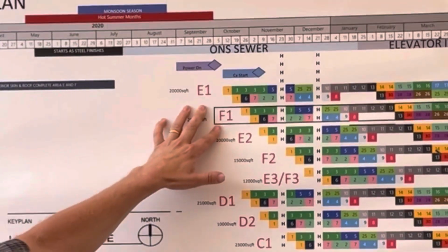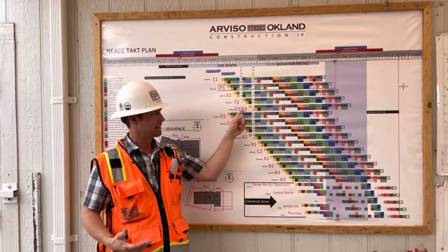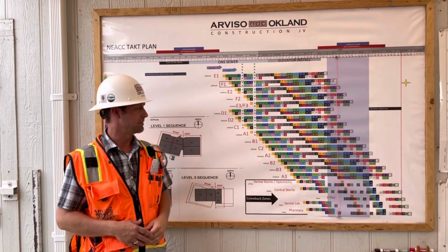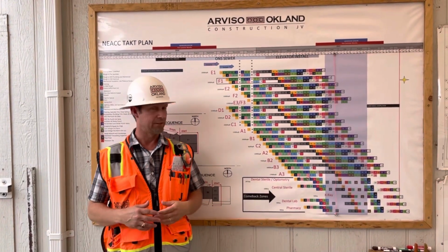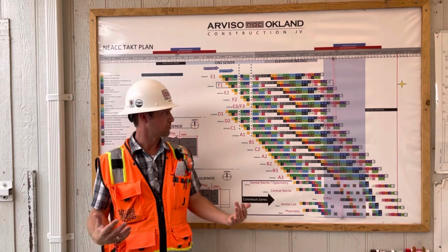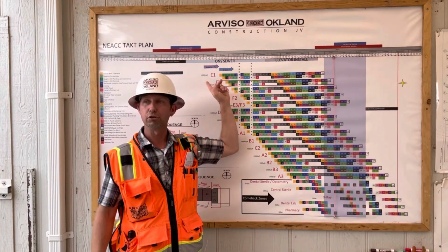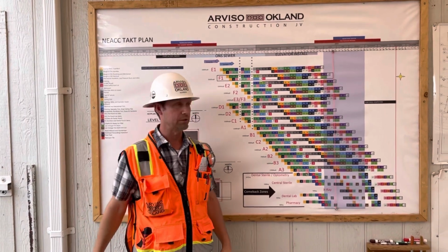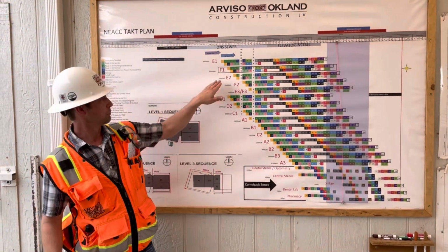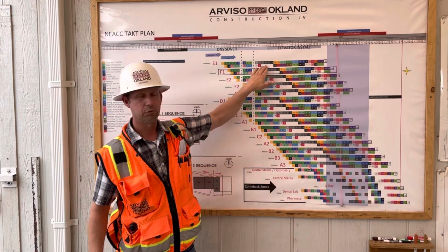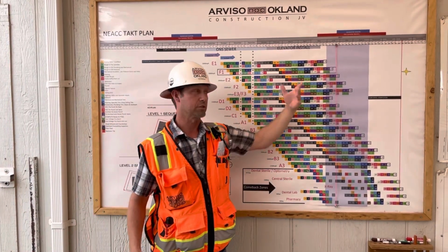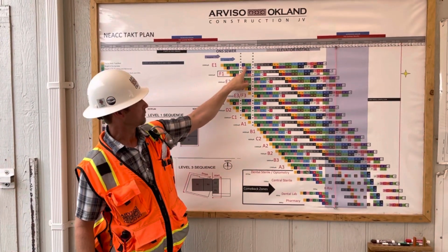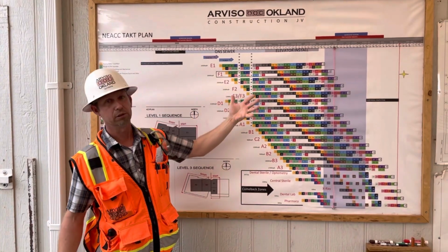So in your building, it may be that you haven't divided it into areas. Maybe it's smaller, and maybe it's rooms. Maybe it's different phases in a project. And on some smaller projects, you may have one line. Maybe you're doing everything at once. You have your framing going all the way through, you have your roughing going all the way through. Same concept. So you've got your line. The first thing when you're building is you build your line sequence of how you would build that, going across, and then that duplicates going down.